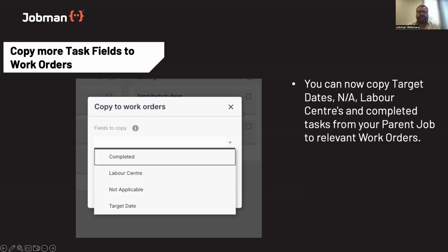Where it gets let down a little bit is if you've got particular CNC machines that run at different speeds, and this is relevant to a lot of industries, especially cabinet making, but also a lot of other industries we deal with, where you actually want to separate that into a separate area, because depending on the job, it may go to a different machine. That can easily be done in the software. You simply go into the operation and choose labor center, and now at the job control phase, you have the ability to schedule versus the right capacity in that area.